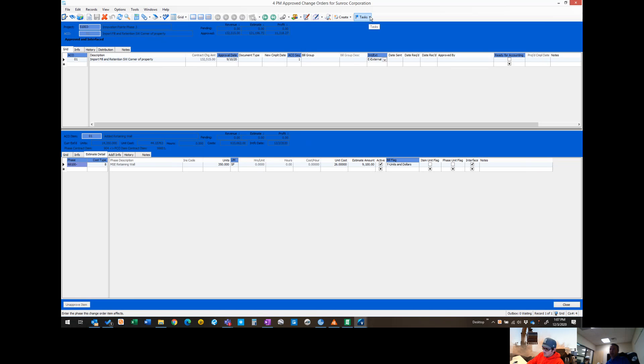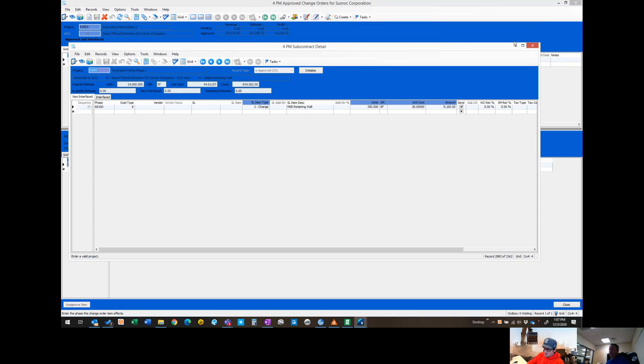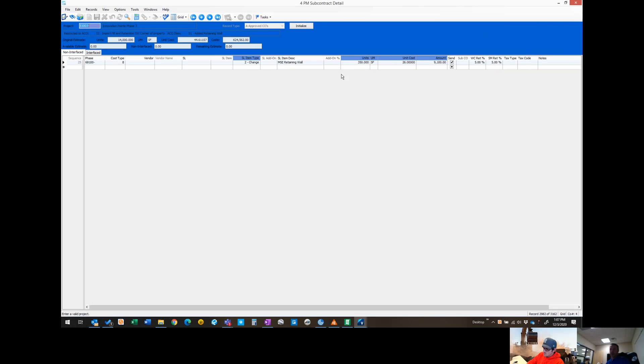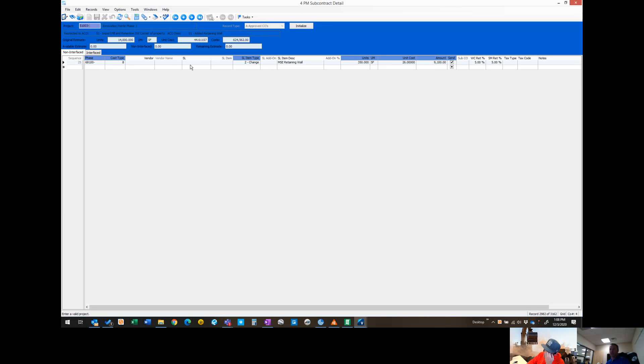In the task menu at the top, there's an option to jump right to that subcontract detail. That screen pops up and pulls up the job we were on, the original estimate square footage, and the original unit cost. Now it has this new line item down here. You'll notice it shows we're in an approved change order and it automatically defaults to this SL item type to change.